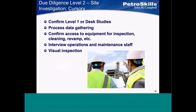Due diligence level two — site investigation. Now we've done all the due diligence at the office and we're going out to the job site. Everything we found working in our office, we want to confirm. So: cursory process data gathering, confirm access to equipment.